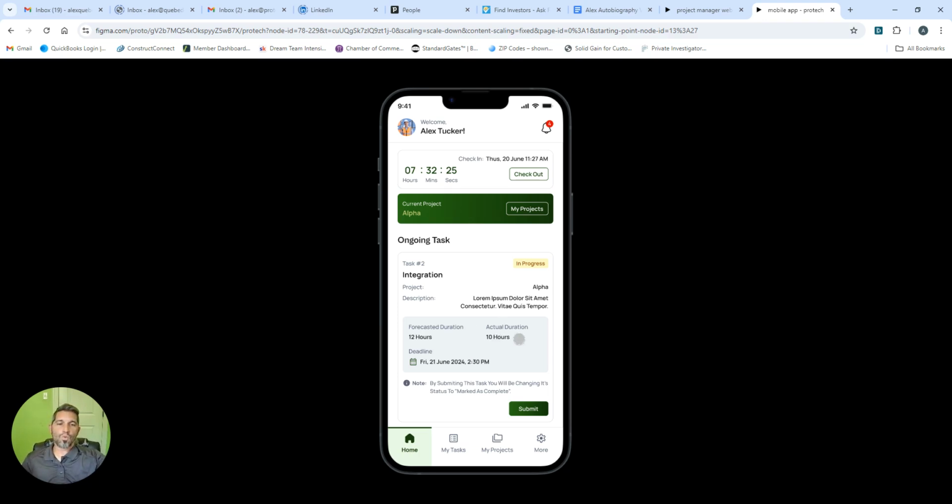When they complete that task, the next one populates, and the next one also has the project and the scope. So when you complete a project, or any time during the project as tasks are getting completed, you can go look at actual time per task, per scope, and per project.